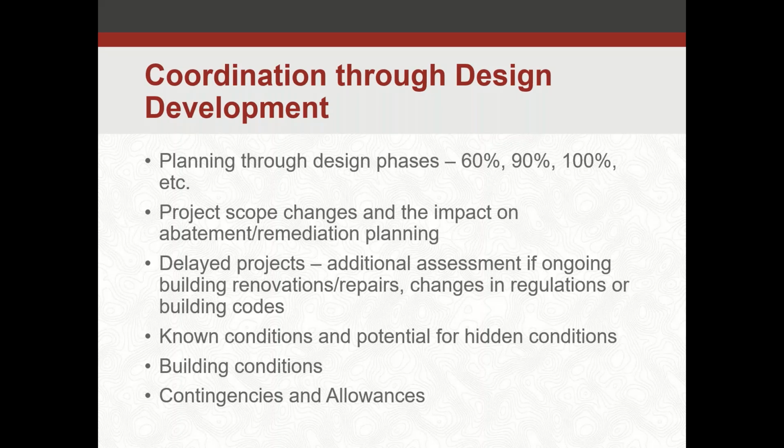planning phase is important. Sometimes you get a scenario where a project becomes delayed, whether it's funding or timing. You know, they still want to think about some things over a period of time. So you can imagine if something gets put off for 2, 3, 4, 5 years, but that facility's still operating, that facility might still be doing small projects here and there to remove different materials or do different renovations. When you come back to it, you're going to want to do some additional assessment, make sure you know what may have changed, and account for that appropriately in your design and your planning.